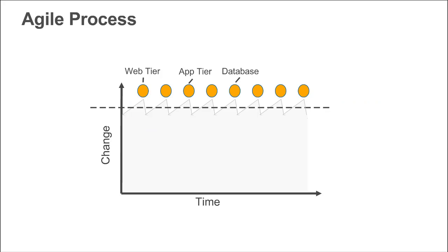As we move on to the next slide, here's a slightly blown up example of the agile or iterative migration methodology. We're breaking up functional components of an application and moving each functional tier in one sprint, a sprint being 2 weeks here. It doesn't have to be 2 weeks. That is just the representation on the diagram. But this is the process that we highly recommend. This is the methodology that we want you to assess and, wherever possible, apply in your migration strategy.